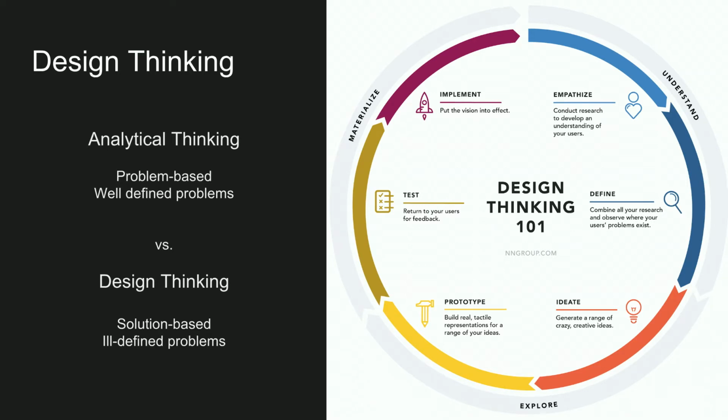And then there's a whole different set of exercises that you can do when you have all those people in the room, to generate all possible solutions. And then you have a discussion to get to a consensus of what the best path forward is. And then you prototype, meaning you create something tangible. It doesn't have to be production ready, it's just a prototype. And the idea is that you use this prototype to validate the ideas that you generated. You actually validate that with real users, and you run your tests.